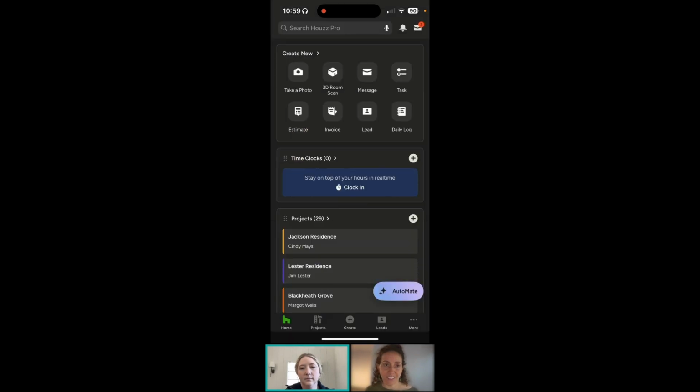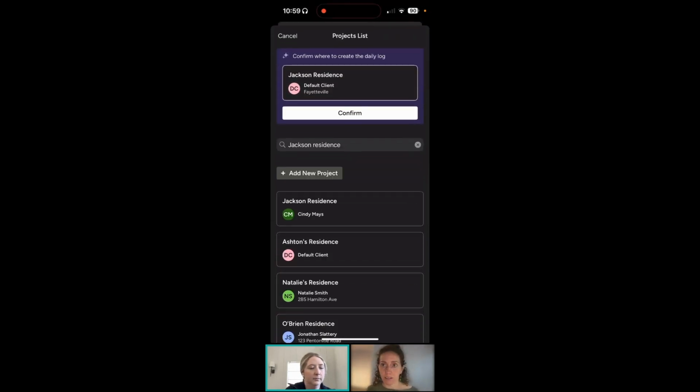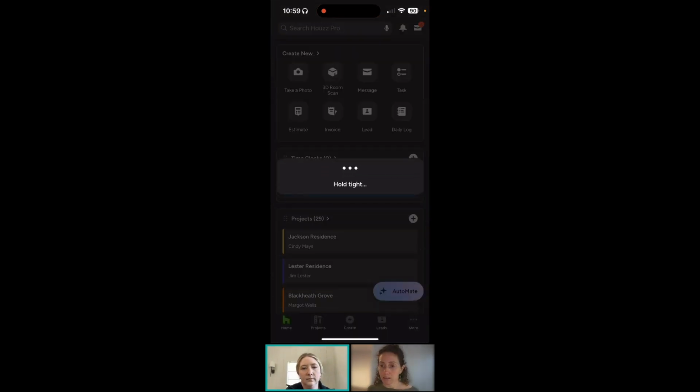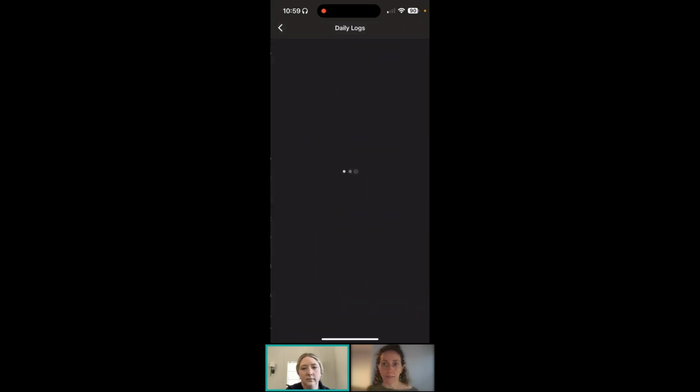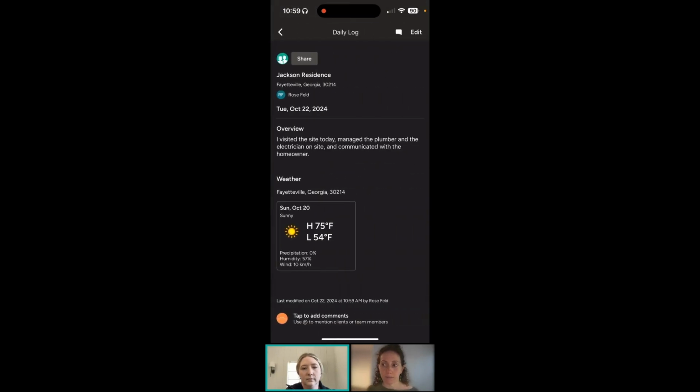Now that I'm done, it's going to ask me to confirm where I want it to create the daily log so that there's no mix-ups. We're going to confirm Jackson Residence. And now we can see that it went ahead and created that for us. Since we have all of our project info already loaded in, the weather is automatically added. Everything that I just spoke ends up in that overview section, as you can see there. And then from here, if we need to start making additional comments to communicate back and forth with our team or with our customer, we can do that here as well.